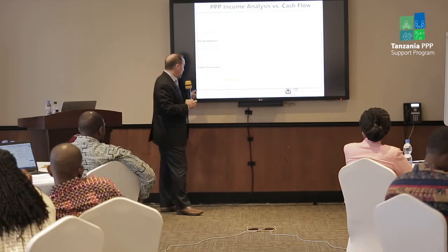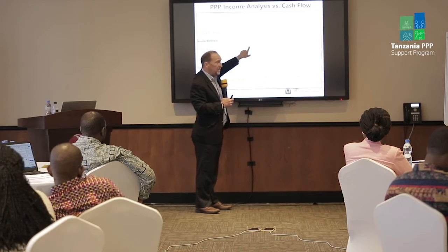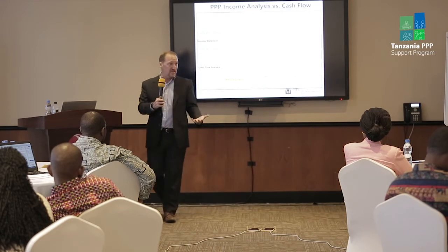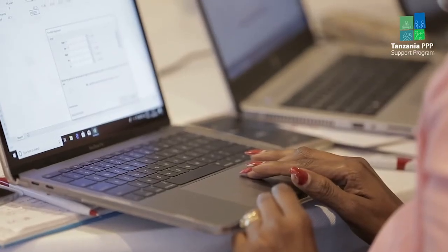Lastly here, I'll show you the debt service coverage ratio, which is if we take 50, our revenue, minus 29, our operating costs, that is the total cash available to service debt, right? Also called EBITDA. For the fancy, we've got some accounting friends here. What does EBITDA stand for? That means earnings before interest, tax, depreciation, and amortization. Yeah. It is the total cash flow available to service debt. We've got 21 million there.